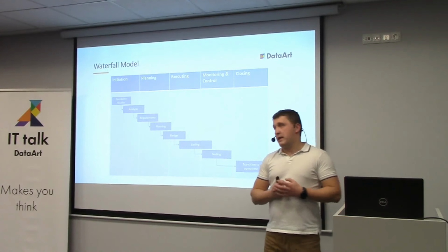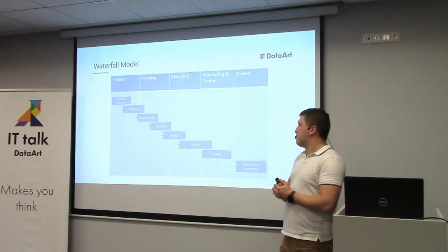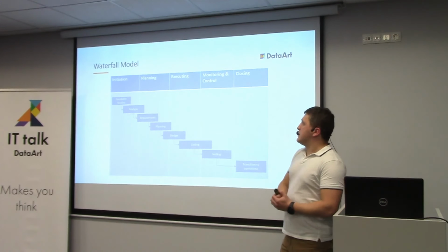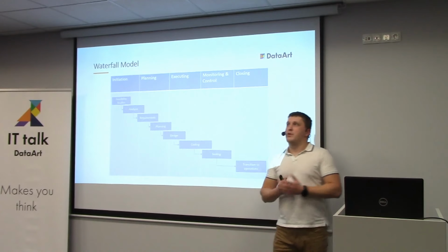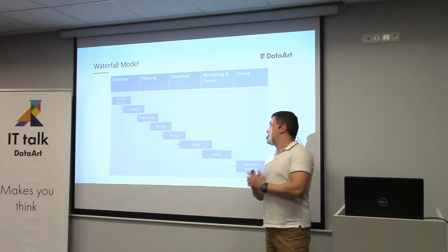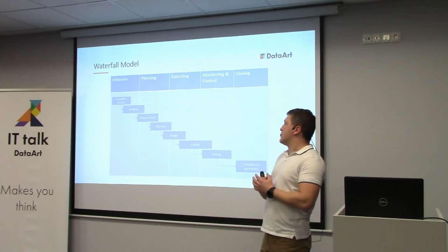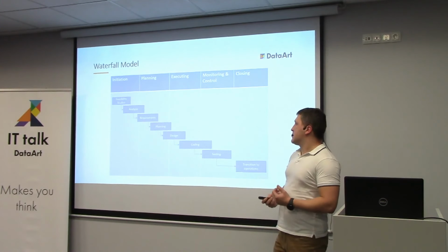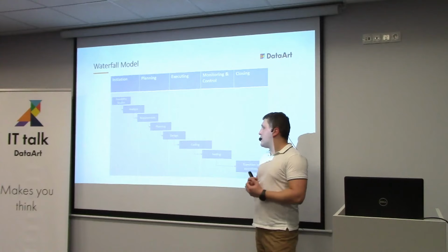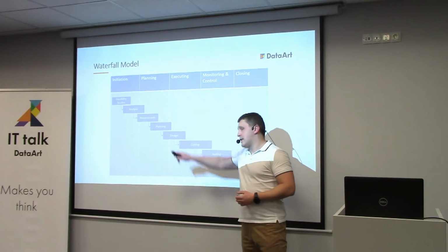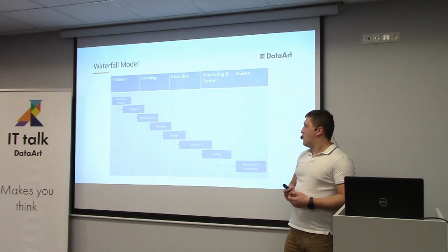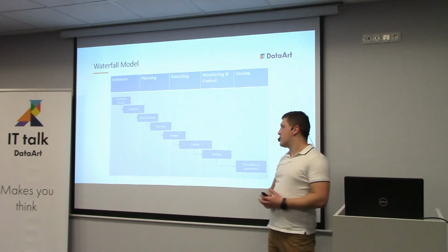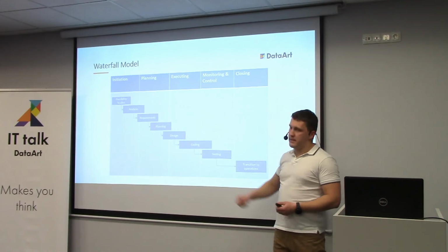And what's bad about this approach? It's very expensive to jump back in time, right? I mean that if there are any mistakes here in our design, for example, there's a high probability that we will not know about them until we start testing.